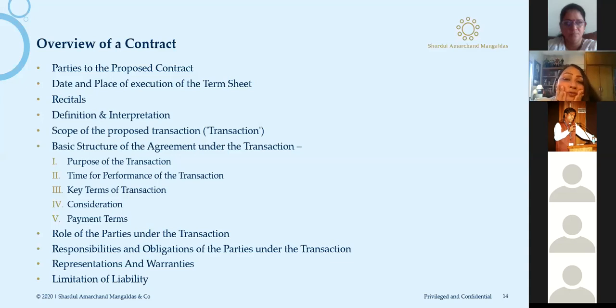Of course, in the provisions of the agreement also, we will bring it out in terms of importance, because if certain things are done beyond the time, like for example, I wanted my invitation cards to come for a wedding, and let's say I've paid ₹1,00,000 for it. Now, if you decide to deliver it to me after that and demand the money, when I have told you specifically via email I need it, let's say, 1 month before the wedding, it's no point if it comes to me on the day of the wedding or after the wedding, right?